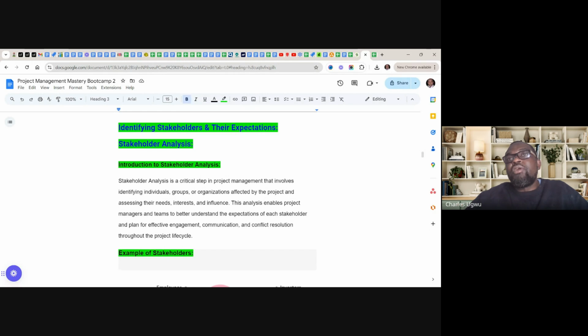You might not know them very well. You might just see a list of stakeholders. That is not enough. That you have a list of stakeholders is not enough for you to know what to do with that list. You need to build a communication document, a communication map on how to interact with all of them, and understand where they belong. Having the list of them doesn't show you their level of interest. Having the list does not show you their level of influence.